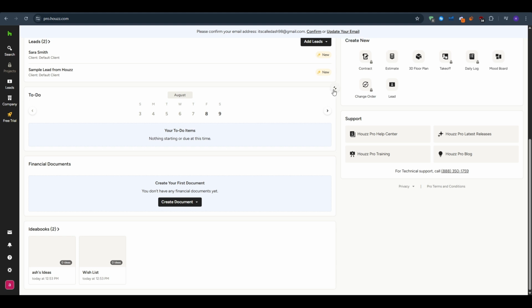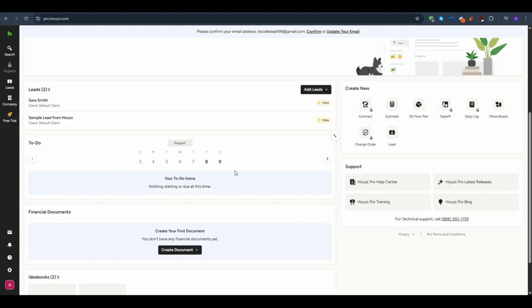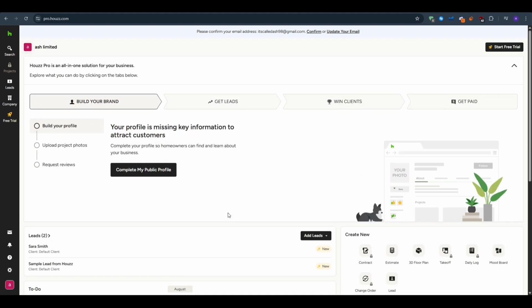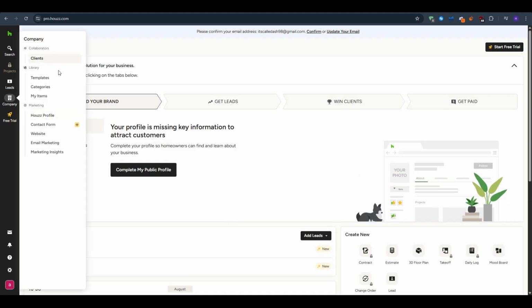Mood boards and idea books, as you can pull Houzz inspiration photos, supplier catalog images, or your own site pics into one board. Change orders, so when your client upgrades to waterfall edges, you can open the existing estimate and then duplicate the line and edit the price, push a change order, or capture a fresh signature. All of that in just 2 clicks.